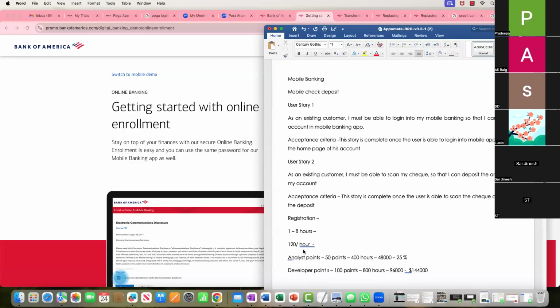For example, if you got a promotion from an advisor to an executive advisor, you're not going to charge $120. You're going to charge maybe $30 extra. So all that we will include in this pricing point. This is not something standard. Today it's 120, maybe 6 months after that it can be 140 or 150, depending upon your price rate or how your salary is increasing or how much bonus you got, and all that will come into this hourly rate.